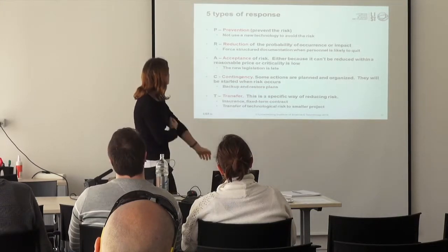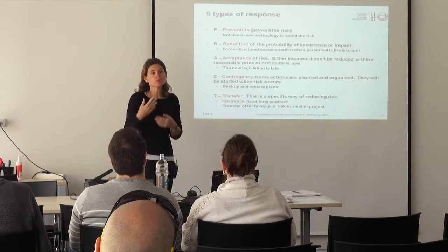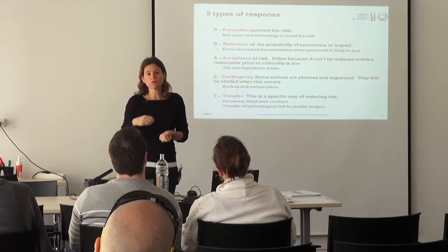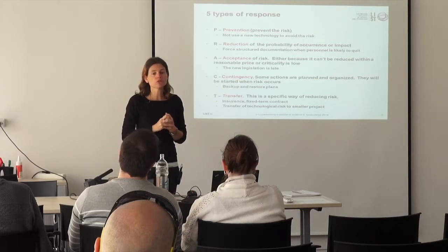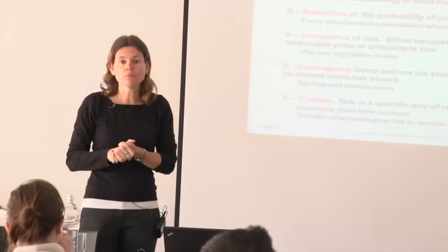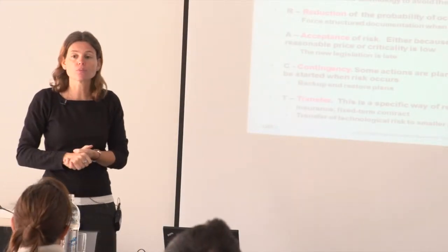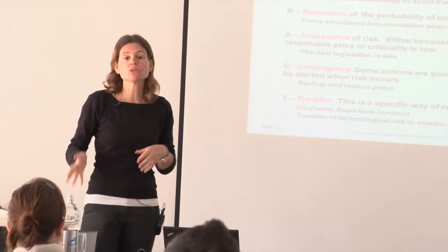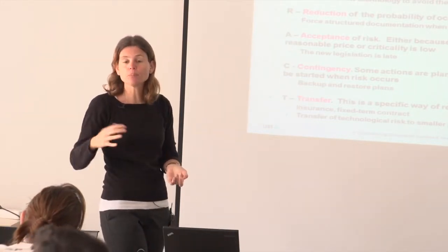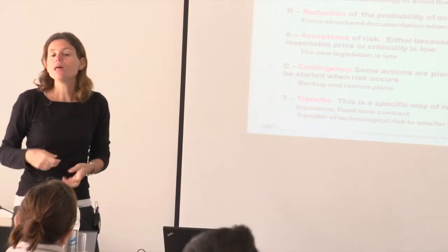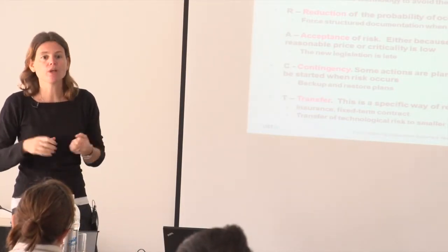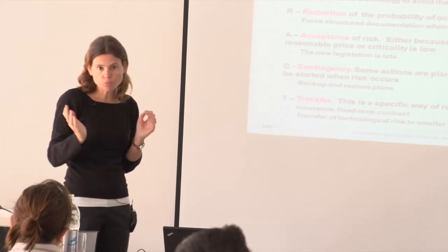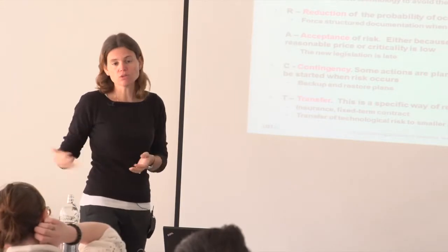Or, for example, here, not using that new technology we wanted to try on that particular project, because there is a risk that trying to understand that new technology will be more costly, will take us some more time on the project. So we decide we are not going to take that risk. So we are going to stick to the old technology. It's not that important to achieve the results of the project. We wanted to do it, we wanted to play with it, but we've measured the risk. It's too big. We decide to prevent the risk totally by using the old technology.